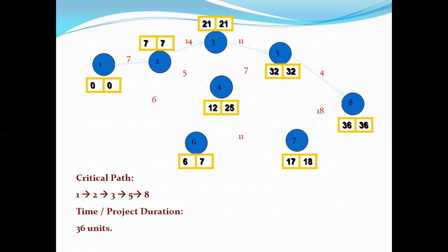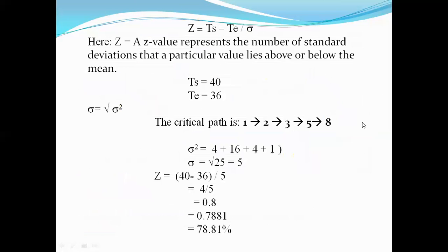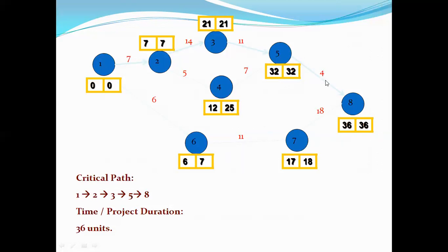We are just subtracting the value. So how do we calculate? 36 minus 4 is 32. 32 minus 11 is 21. 21 minus 14 is 7. So point number 2 can be achieved in a reverse manner by this path also, 5 to 4 to 2. So how can we get the value of this? Remember, this value is 32, 21 and 7.